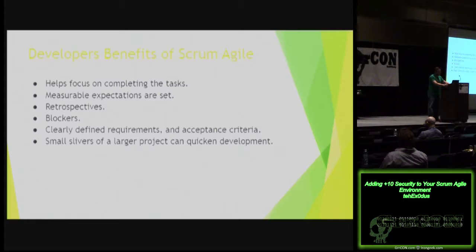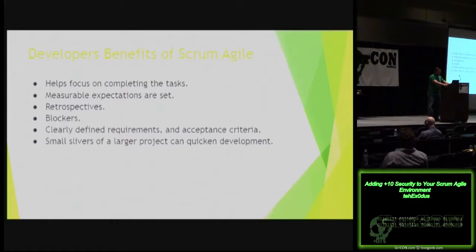Within this daily meeting, a recap is given of the previous day: this is what I worked on yesterday, this is what I'll be doing today, and if I complete that task, this is what I'll be working on next. Any issues are brought up and handled. Measurable expectations are given with a predefined length of time — a task is already laid out: this is going to take me six hours, or three hours. That time is set and the acceptance criteria is already written out, ideally, though that doesn't happen all the time.